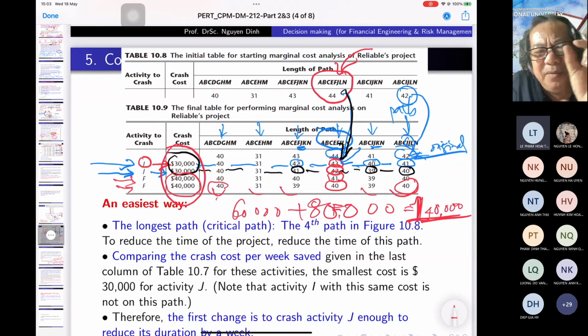Because the time for each node includes some uncertainty factor, and this is just reduced to 40, but the probability of realizing it in 40 weeks may be very low, because of the uncertainty in the calculation of the duration. So many things make this dangerous.